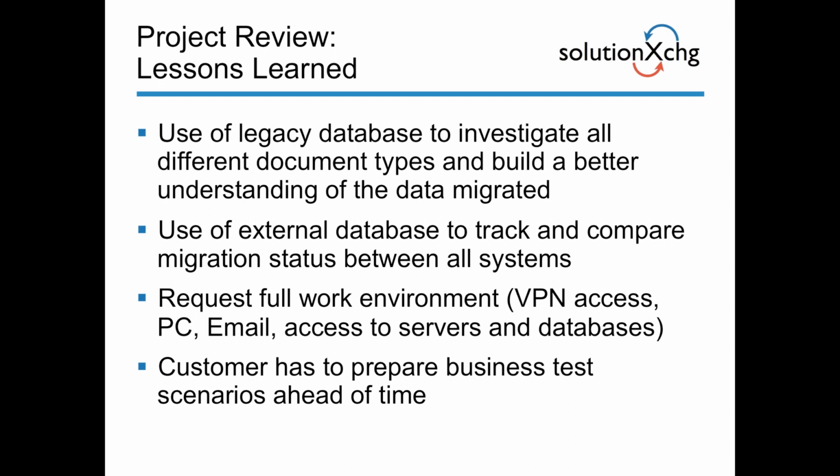It is definitely necessary to have a full work environment, VPN access, maybe a dedicated PC, email, access to servers and databases to effectively do the work. And the customer has to be involved to do business testing and scenario testing ahead of time. It's very important that in order to have a smooth transition, the customer is able to verify the functionality of accessing archive documents in the current state as well as in the future state, and takes on that responsibility.